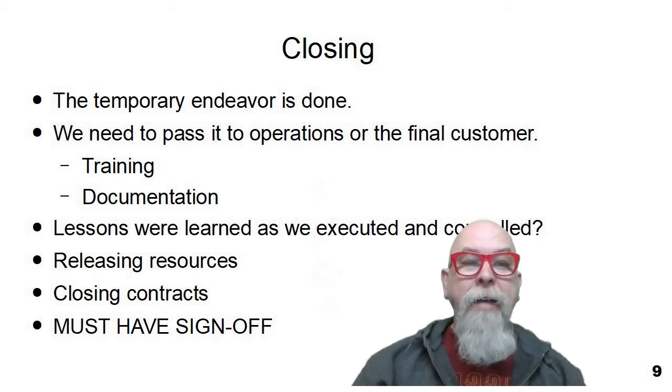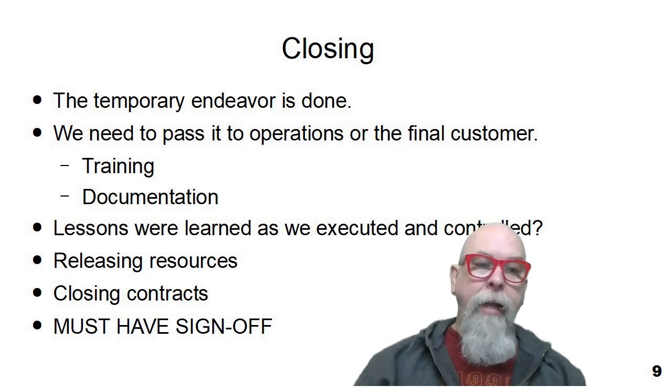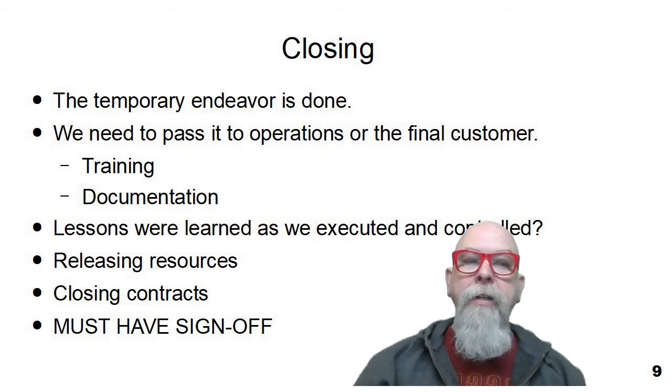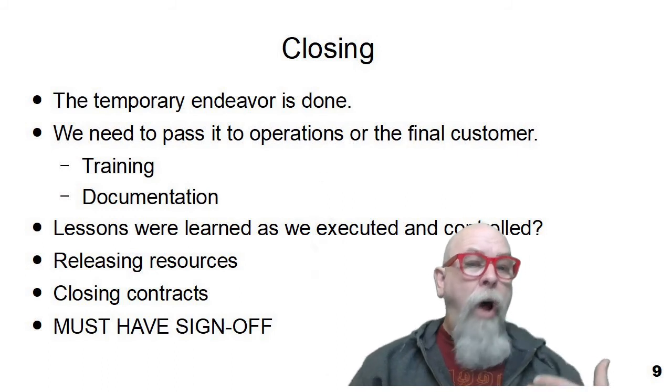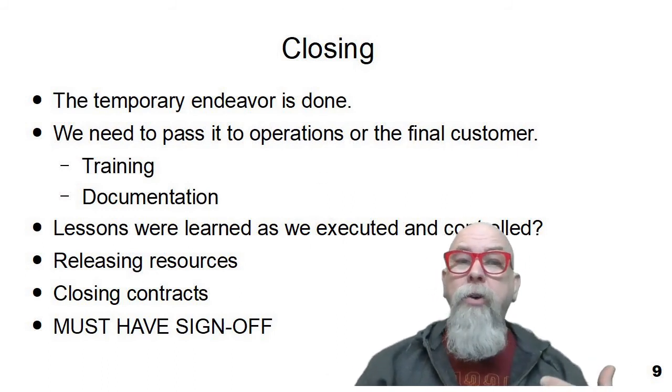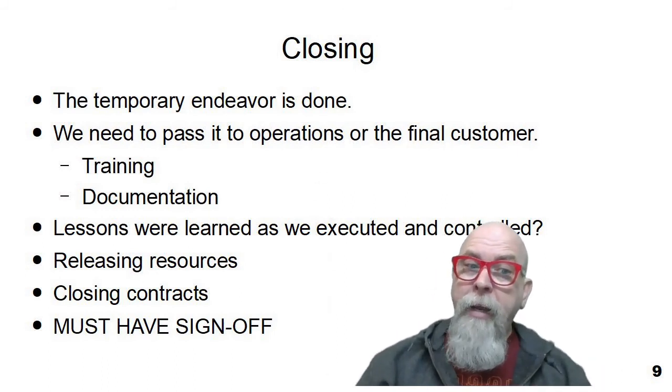We need to pass this project either to operations for daily use, or we need to pass it to its final consumer. We need to finalize and complete the training. We need to finalize the documentation. We need to figure out what lessons we've learned as we've executed and controlled. What things did we do right, and what things did we do wrong? And there will be plenty of those probably as we go through a project.